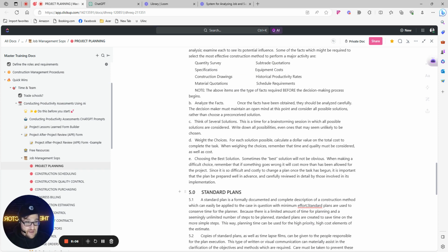So again, I've given you guys a general overview. For guys that are just working on their own, my suggestion to you, like I said, you can have a 5 or 6, whatever it takes, a checklist of all the things that need to be done prior to the job. So the job is starting the exact same way every single time, so that when there is a problem, let's say that occurred in planning, we can go back and make some adjustments, all right? And that problem won't end up happening again, okay?